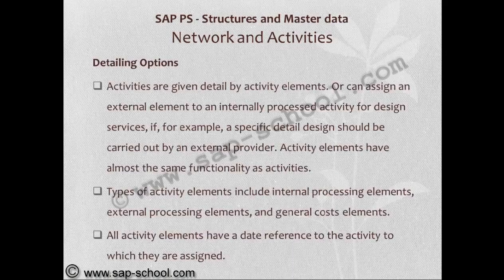Activities are given detail by activity elements. You can assign an activity element to an internally processed activity for design services, for example, if a specific detailed design should be carried out by an external provider. Activity elements have almost the same functionality as activities. Types of activity elements include internal processing elements, external processing elements, and general cost elements. All activity elements have a date reference to the activity to which they are assigned.